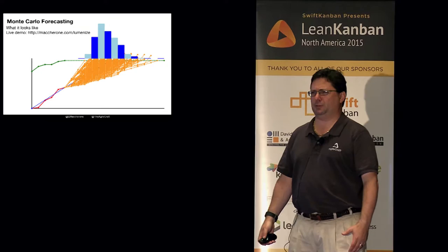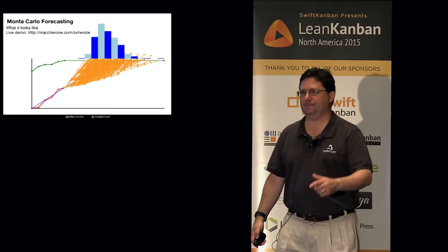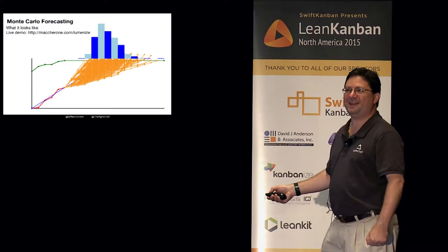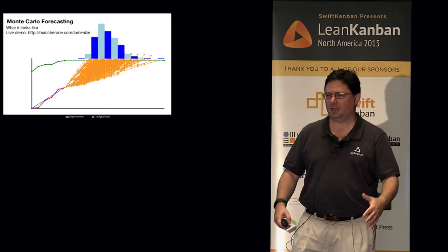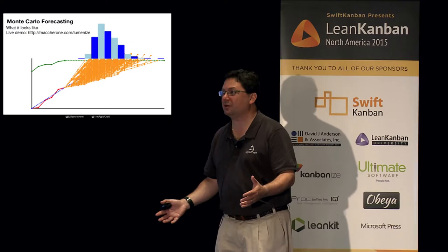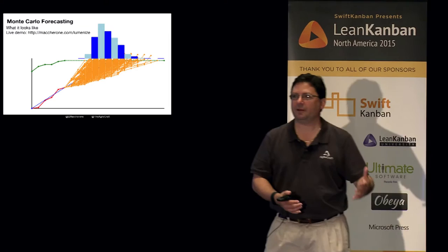He's like, well, what am I supposed to do with that? I don't know how to read that curve. Well, how much risk can you bear? I'm the pointy-headed manager. I can bear no risk. So that's this date right out here. How do you like that one? Well, I don't like that date. Maybe I could bear some risk, but marketing is going to have a conference, and they're ramping up some material. Well, tell you what, why don't we go to marketing together, and let's figure out what the trade-offs are, and what the possibilities are, and how much risk they're willing to bear, and the company is willing to bear in these circumstances, and then we'll make the right decision on what to do here.